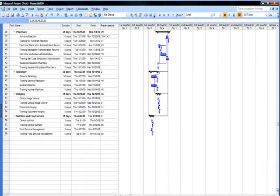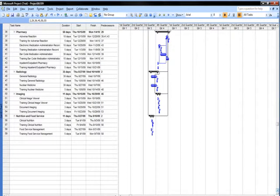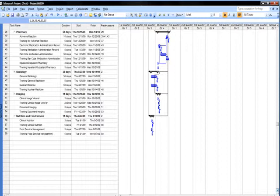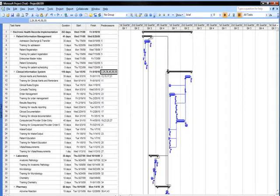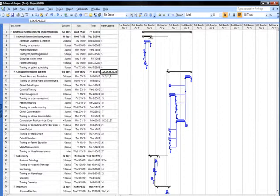As a continuation, this image shows that the pharmacy level has a duration of 58 days, radiology has a duration of 35 days, while both imaging and nutrition and food services duration times are both 11 days each. On the right of the image is the Gantt chart which shows the visual representation of the project timeline.